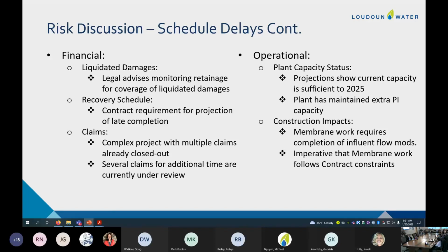So that's changed work that's been added to the contract. So that was not work that was originally scheduled. Now, so far on those 10 changes, there's been no time associated with those. So when the contractor and we, as the project team, settle up those changes, they haven't asked for time on those changes. But the 11th change order will undoubtedly have some time in it, and we're working on that particular one right now. So they're going to start to involve some time.